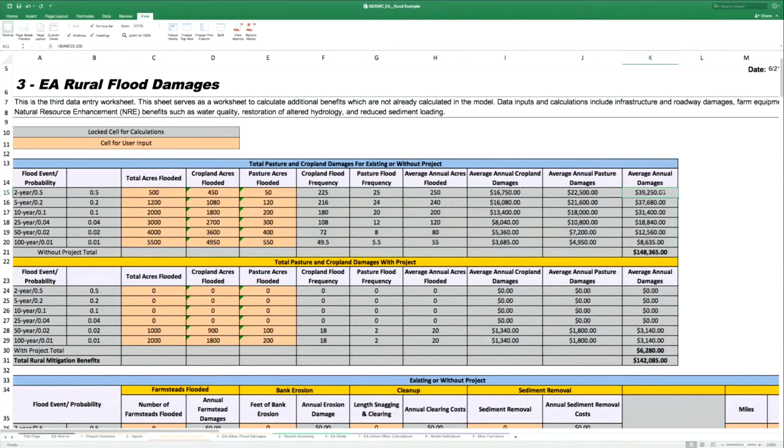Because when we incorporate the probability of a 500-year event, even though you might have $1 billion in damages, what's 1 billion times 0.002? It's a much smaller number. So if you have to spend $150 million against that 0.002 probability to alleviate $1 billion in damages, all of a sudden your benefit cost ratio is not there.